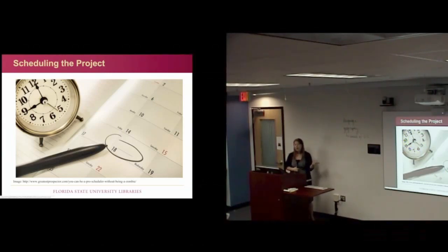But what I do here, and that is key to us planning and scheduling in the DLC, is I figure out how many hours we're talking about. Are we talking about a project that's going to take 200 hours, or are we talking about a project that's going to take like 1,000 hours? And how does that fit in with the rest of our planned projects that have a different set of hours?